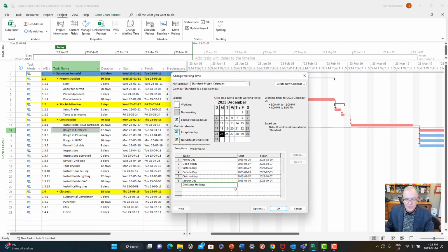And probably the easiest in this case is just to say, boom, the 25th, and then go to, what did I say, January 1st, so that I blocked it right off from then to January 1st. And if I go over here, you see that it's blocked off there. These are just showing the darkened part. Bold just means it's been edited. So yes, it's been edited. These are still off days. We just ran it right through. It was easier that way than putting extra line items there.